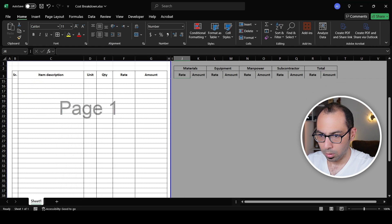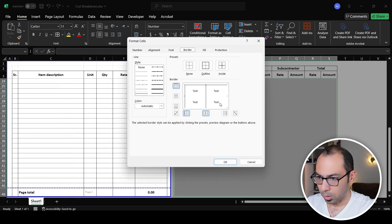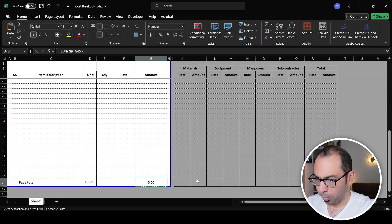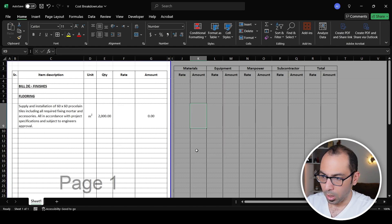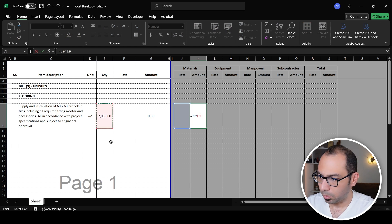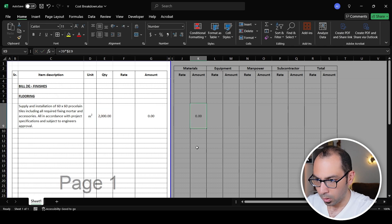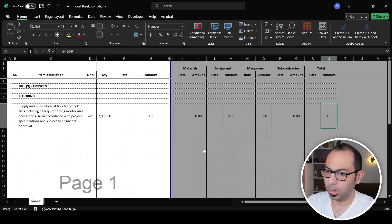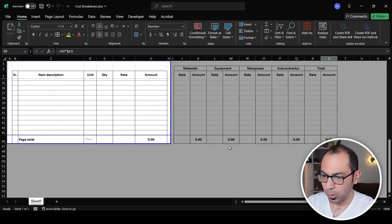I'll size the columns, apply borders all the way down, and add a total row under each cost element column. The amount for materials equals material rate multiplied by quantity — using a dollar sign on column E so when I copy the formula across to equipment, manpower, and subcontractors, the quantity reference stays fixed. This is the first step.